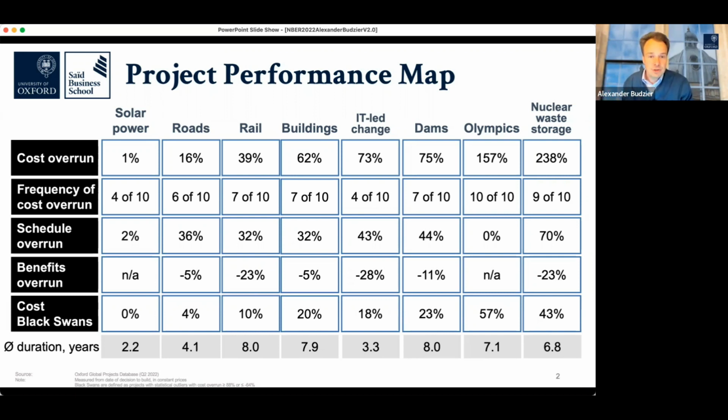So in transport infrastructure, because that's the most comparable measure, that means passenger or vehicle numbers per day compared to the plan. And then in the final row, something that is subject to some of our most recent publications: how often do these projects turn into statistical outliers, or to use a popular term, black swans, which in this case is anything that has cost overruns of 88% or greater compared to FID. So that pretty much doubles its cost. Extreme events that shouldn't be there.